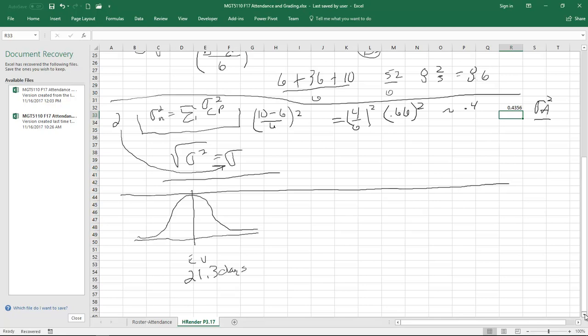Okay? All right? Now, by the nature of numbers, we know that when we have a perfect normally distributed data like this, half of the data lies below the expected value, half of it lies above the expected value, 50-50. And this is something, as a touch point, that I keep driving home here: what's the probability of actually taking up to and including the expected time that we calculated through our project? Well, that only represents a 50% chance, all right?